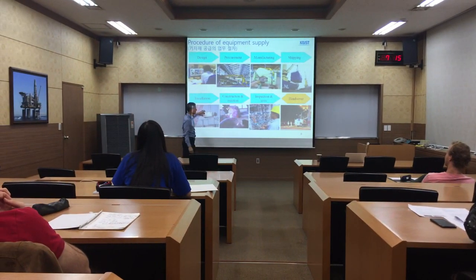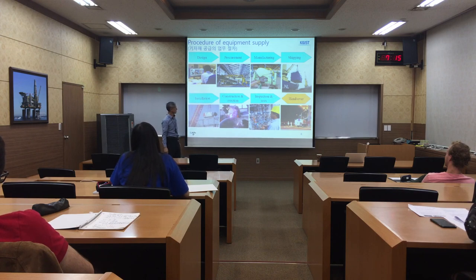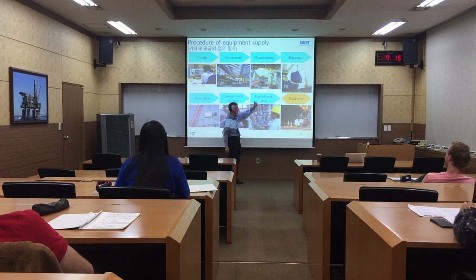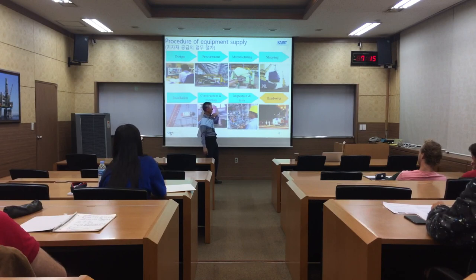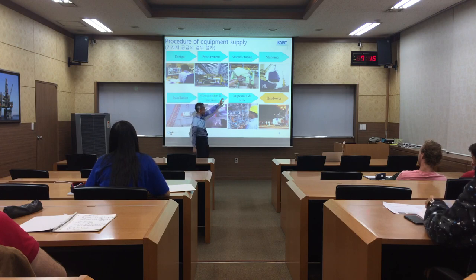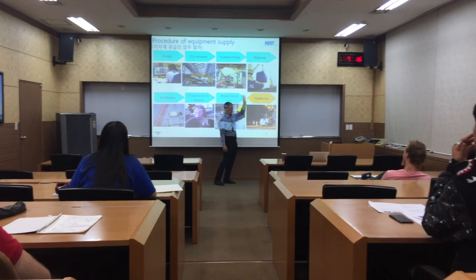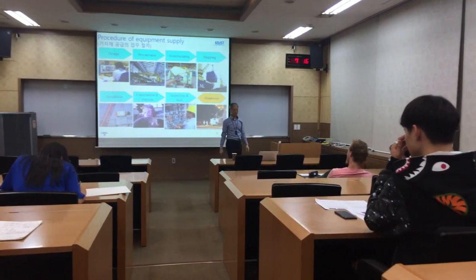And at the installation site, the engineers from the gas turbine or pump supplier should stay together and work together to make sure whether there is something wrong. And this is done by a shipbuilding company. For the inspection, usually done by the shipbuilding company and the owner, but also some few engineers from the equipment supplier should stay there. And finally, the whole ocean plant is handed over to the owner.